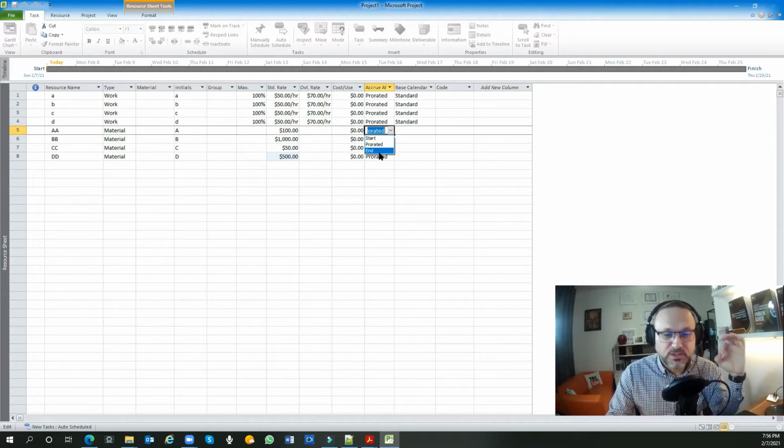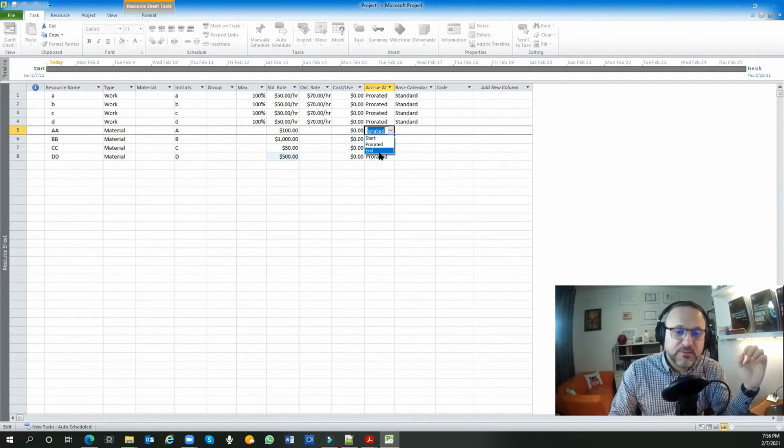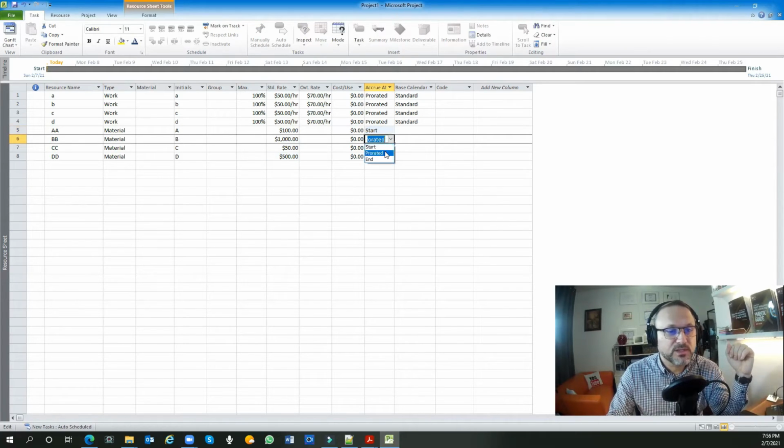Okay, this is important because the cost occurs at the beginning of the project or the activity, or at the end of the activity, or during the activity, the cost will be increased. Mostly because the work as a material has to be done once you have the material on site. Means that you already purchased the material, so the activity starts when you already paid this material to the supplier. So I'm putting it always on the start.